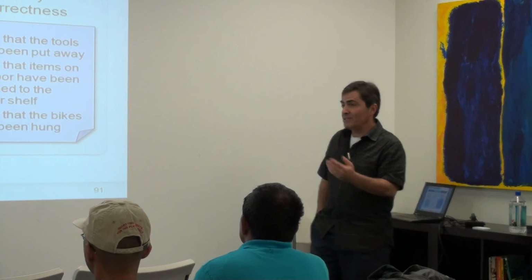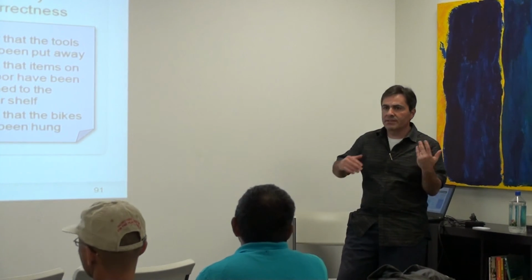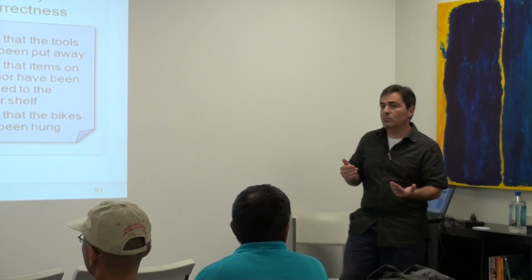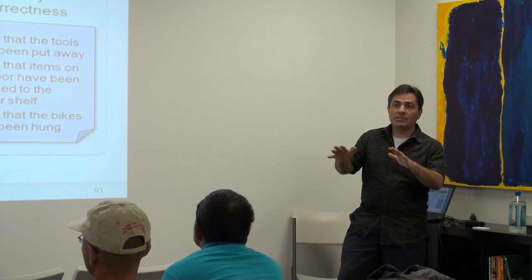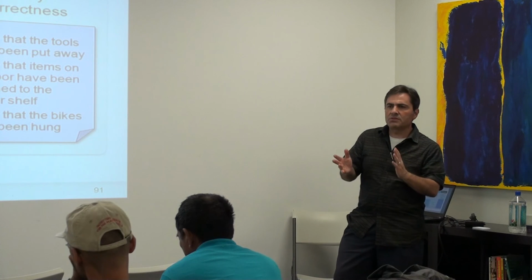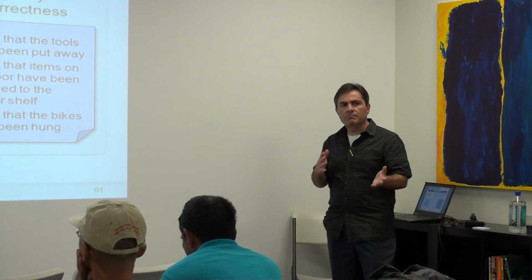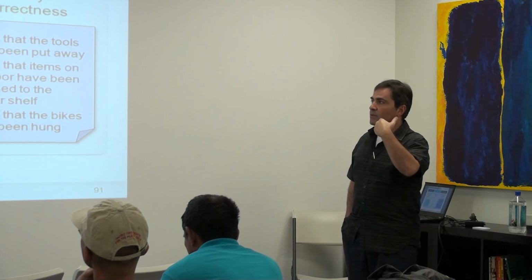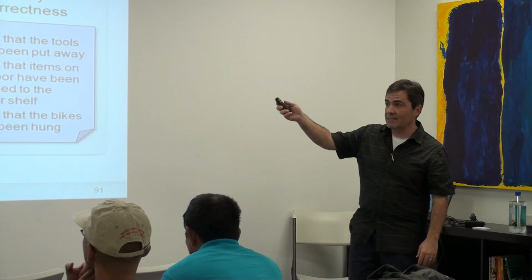Scrum Master, the recommendation is that Scrum Master is a part-time role. Because a Scrum Master is making sure that the team is facilitated and has what they need, but that's not a full-time role. So a lot of times what's recommended is to have a Scrum Master that has a project management background be the Scrum Master of 2 teams. So then it becomes a full-time role. Product owner may be able to do 2 teams also, but usually, depending on the level of complexity, it ends up being just enough for 1 team. Because remember, they also have to be thinking ahead: here are all the things in our backlog that still need to be worked out. Because if we want to get to that definition of ready, you can see that's a lot of work.